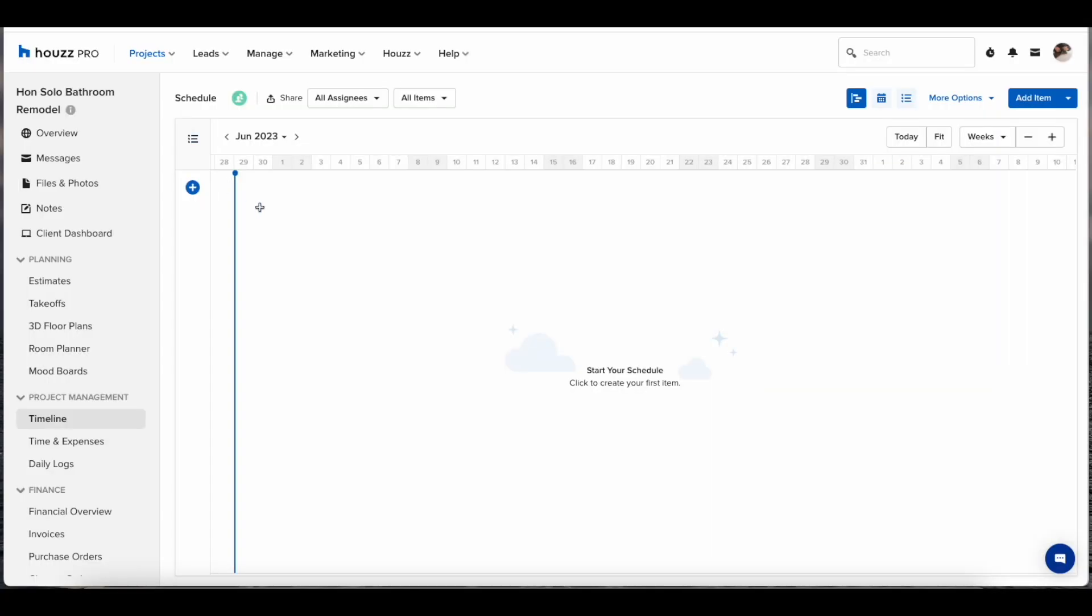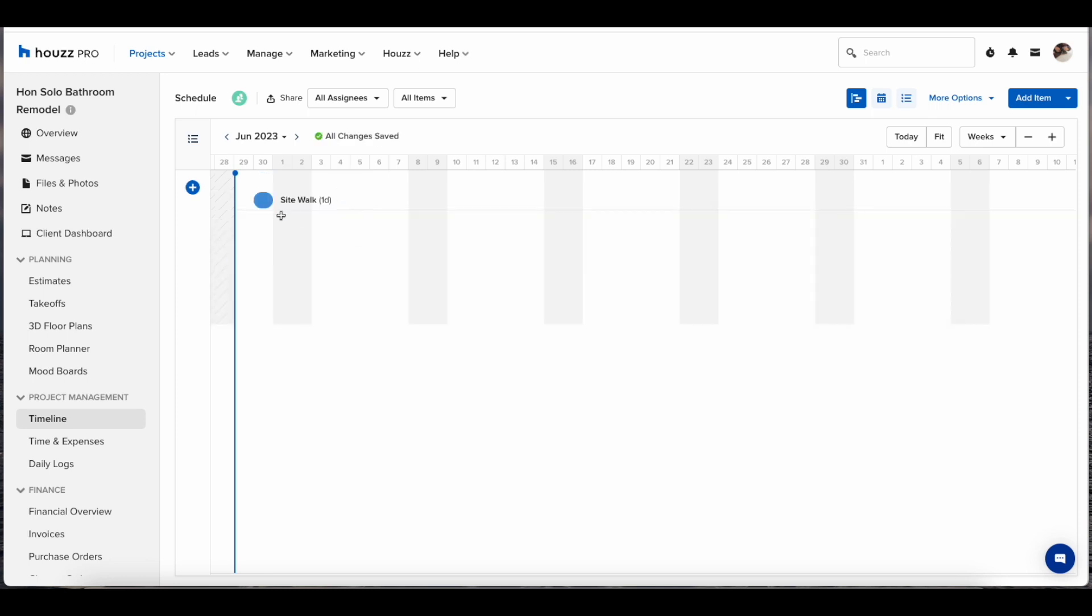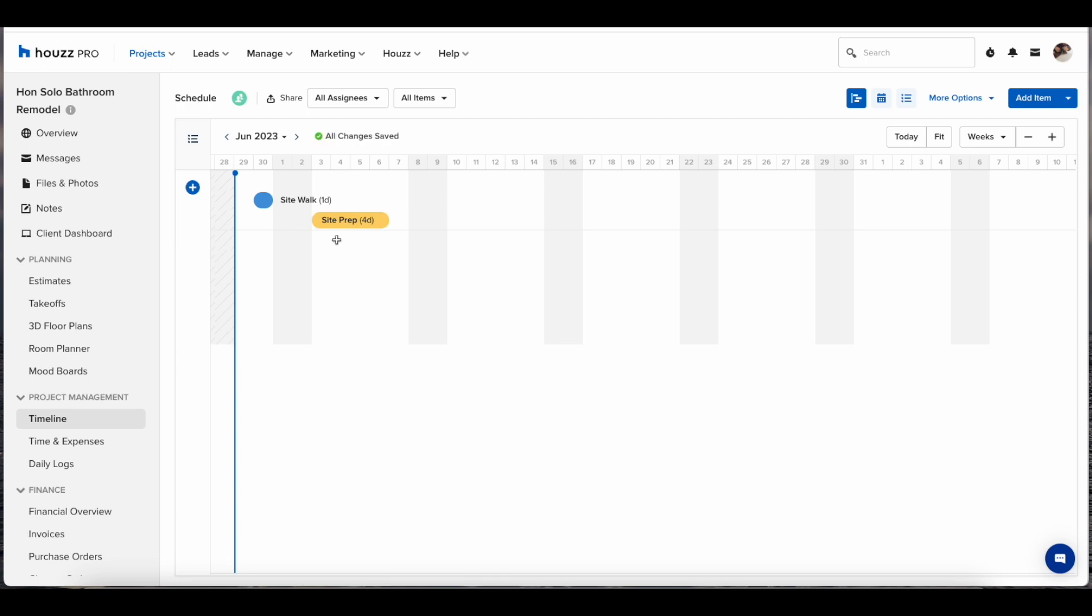From the blank state to create your first item, simply go to the project start date and click anywhere on the calendar. This will bring up your first item which you can name whatever it is that you want. Once you're happy with the name, you can click, drag, and drop to determine how many days that item is going to take.